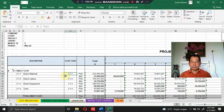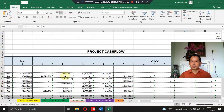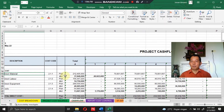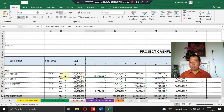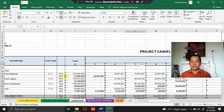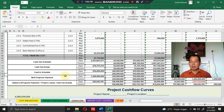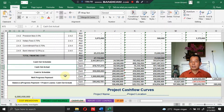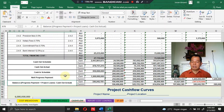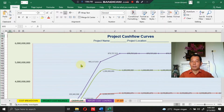In the project cash flow section, you will see project cost per month — plan against actual — for one year of project operation, represented by numbers 1 through 12. In the below section you will see cashout schedule total, cashout actual total, cash-in schedule, net progress payment, and balance, which means net progress payments plus project loans minus cashout actual. This section is also equipped with a project cash flow curve.